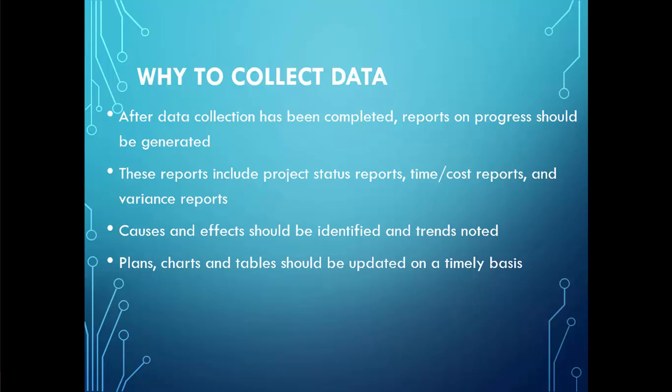Causes of any problem should be identified, and the effect of that problem on the project progress should be documented. For any change in the plan, a change request should be submitted, and plans, charts, and tables should be updated. The impact of change should also be documented.